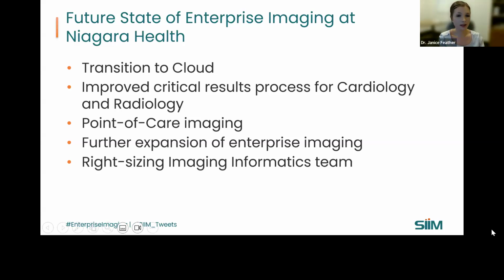Amazing, thank you. And then for folks who are doing that work, I think there's also that great lesson learned, that many times different organizations do their procurement in different ways. There have been ultrasound units ordered for our cardiology program that we find out about like 6 months after they've been here. So really ensuring that our informatics professionals are involved in some of the procurement decisions, so we can make the right decisions right off the hop in terms of what those integrations look like in our Sectra solution. Certainly that has been some continued work that we have to do with our other departments across our organization.